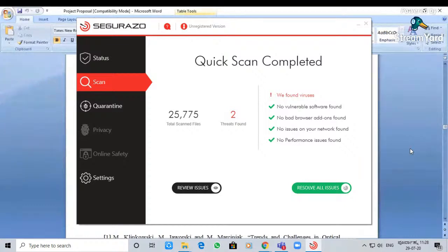So this could be kept as 10% or 20%, depending on the principal investigator's idea of writing the budget. So then you have a grand total, and please understand that the grand total is the one that will be sanctioned if the project is found suitable for funding, and no additional cost will be given by the funding agency. So one needs to be really sure that this is the total amount they will need to do the research.